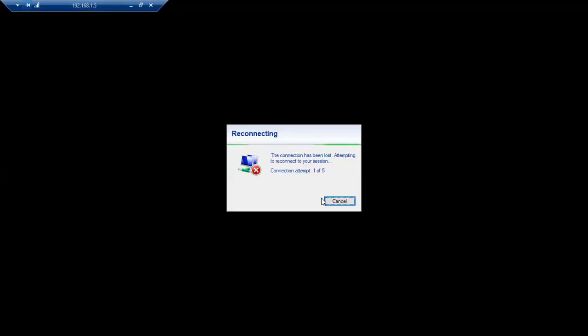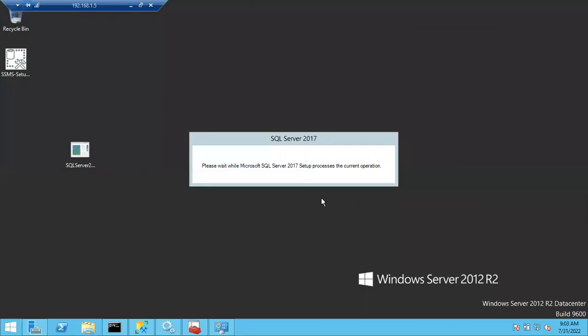If you need any Windows team support, for example, you just restarted the server but the server is not coming online, what you have to do is take Windows team help. They will come and check it and they will fix the issue. So you cannot guess that it will be completed in 30 minutes or 1 hour. Generally, if everything is good, patching can be completed in 30 to 45 minutes or hardly 1 hour. If something goes wrong, it might take 2 hours or 3 hours. So the best practice is always take 3 hours downtime.